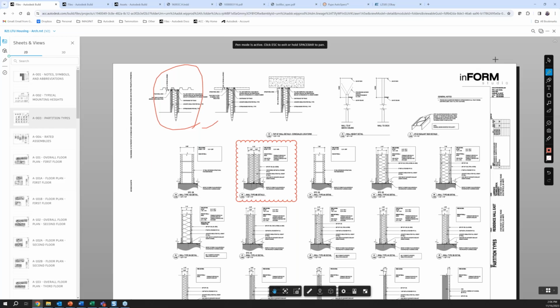If there's a change to the spec, then we can track that, we can review it, we can update the spec. But generally, I would say it's part of that sort of that 100%, getting to that 100% CD, that it should be specified during the BIM phase, not during construction, obviously.